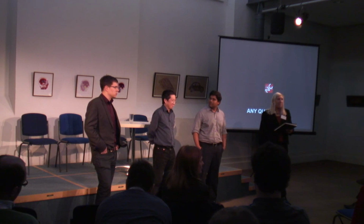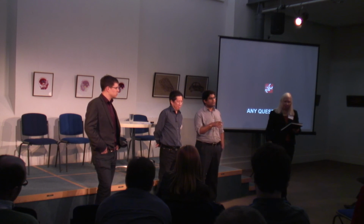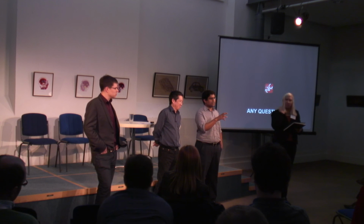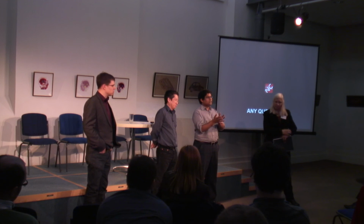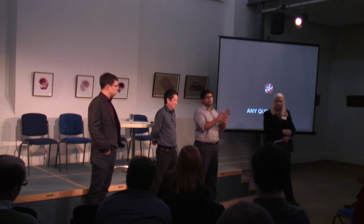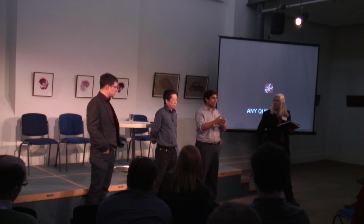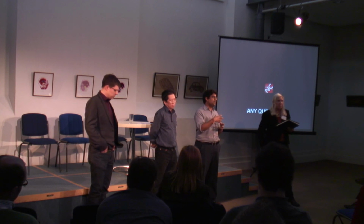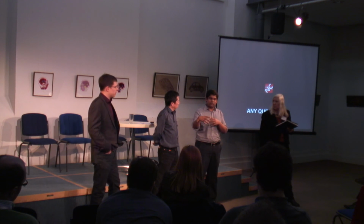But going to the question about... To answer, or shall I? You can, yeah. If I understood correctly, the question is about how you bridge that gap. I think with the BS standards which have come out, the BS 1192, and then PAS 1192 Part 2, and Part 3 is going to be FM related, the key thing that's coming out is getting the operator involved in the design stage early. It goes back to knowing what you want the model to do, how useful it's going to be at different stages and who it's going to be used by.